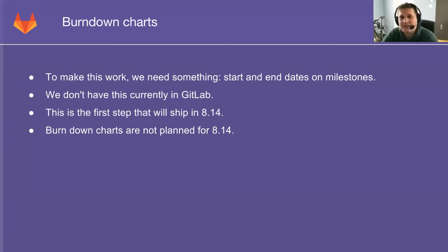Well, there is definitely a relationship, because those two give an overview of what's going on, right? But these are also separate. Cycle analytics is for a time range, like the last 30 days or the last 90 days or the last 6 months, basically. Whereas the Burndown charts are just for the milestones, and they will only measure the issues or the merge requests, which are still good indicators about project management, just project management. And cycle analytics will cover every step of the way, right? Not just the issues and the MRs. So basically, it's like an additional product to help teams manage stuff, right?